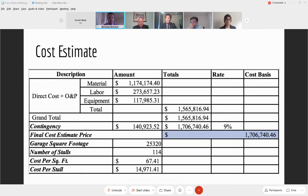So here shows a table that has our material labor equipment direct cost plus the overhead and profit built in to give us a grand total of a little over 1.5 million and then when you build in the contingency of nine percent we're sitting at 1.7 million, a little over 1.7 million. This gives us a cost per square foot of $67.41 and that cost per stall a little under 15 grand which is well under the 30 grand that our sponsor would like. Even though we excluded geotechnical work, I feel like we'd still sit under that 30 grand.